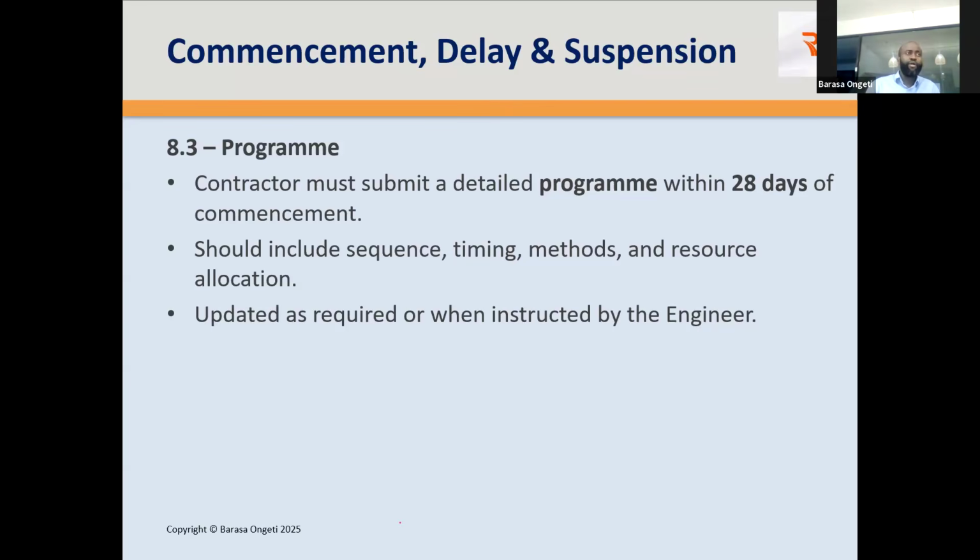If you had a program, you must have indicated that for the execution of the road base, I need to have a sheep's foot roller, I need to have an excavator, and I need to have 10 site engineers on site and 100 laborers. Those are my resources. And I've allocated them to that work breakdown item called sub-base, okay? You may update it as required or when instructed by the engineer.